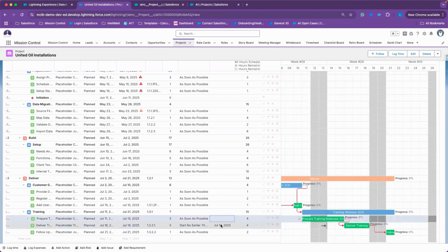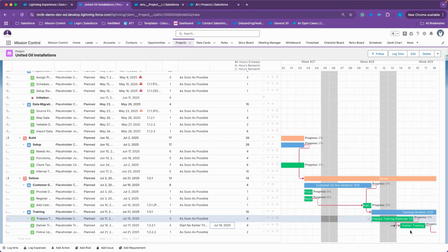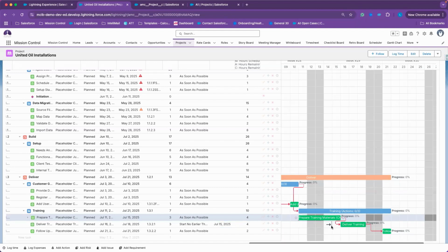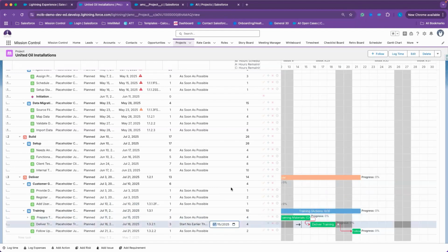All right, so now that I've clicked out of my constraint here, you can see there is a new symbol that is showing here. Now, the dotted line means that I have flexibility to schedule this task anywhere after this constraint. And you see the arrow is the direction in which I can schedule this task. So I can continue to schedule the task this direction, but I cannot reschedule before the 14th of July. Now, if you move this around before hitting save, you do have the ability to move the constraint. Once it is saved, it will lock. Okay.